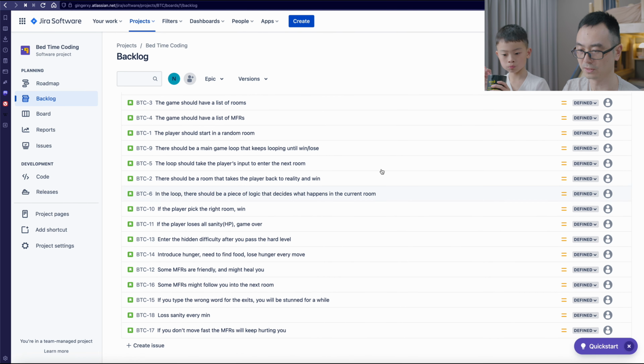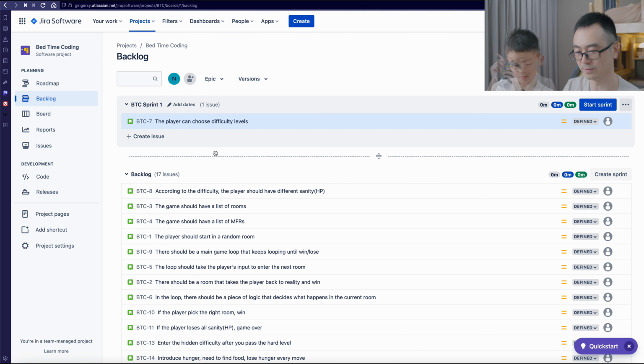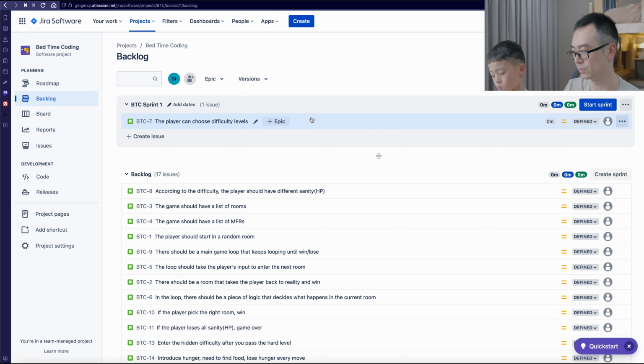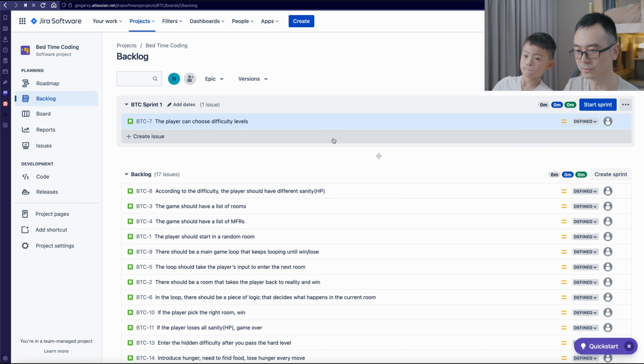So this is our backlog for the moment, for that backroom escape game. This is Sunday, right? So it's the first day of the sprint. We need to do planning. We need to move tickets into this sprint before we can start this sprint. There are several stories you've already kind of done, but they're in testing, right? So we need to move those into this sprint first.